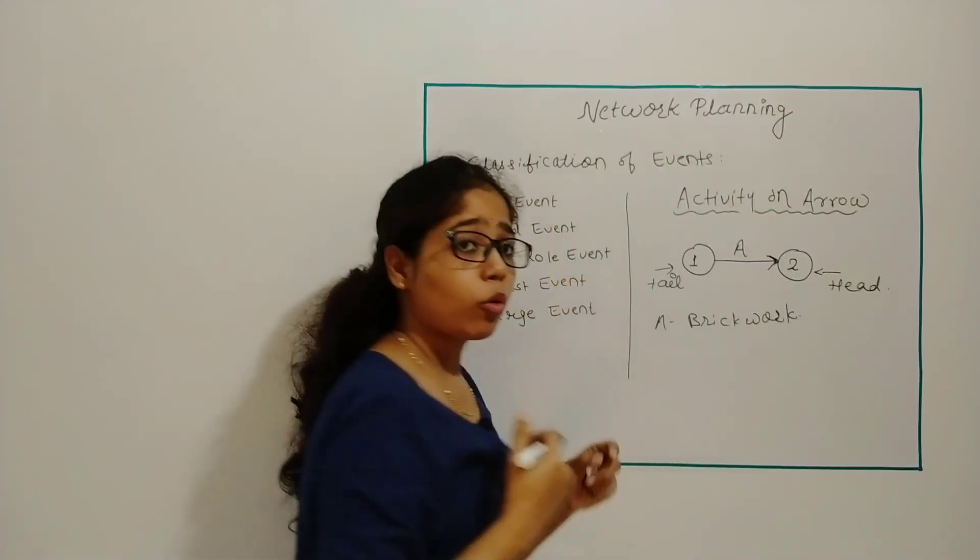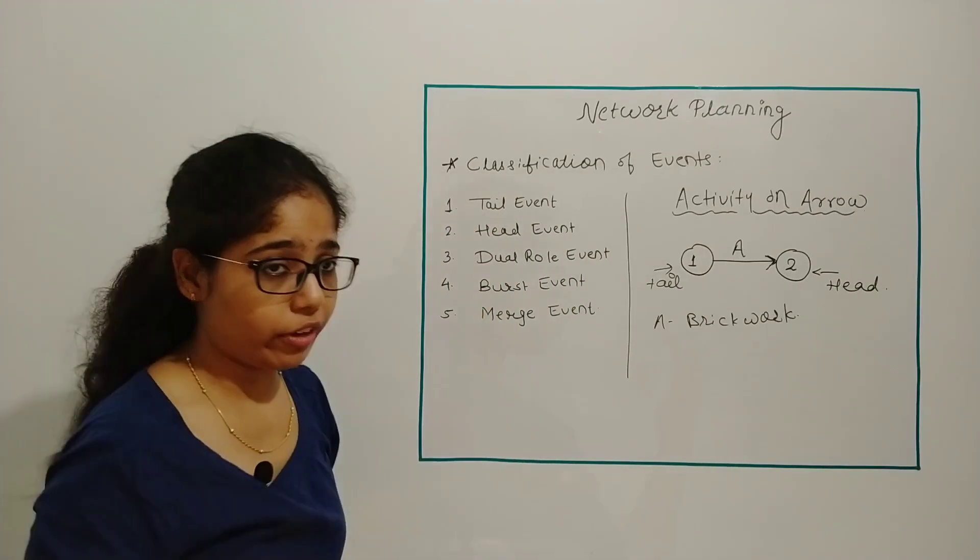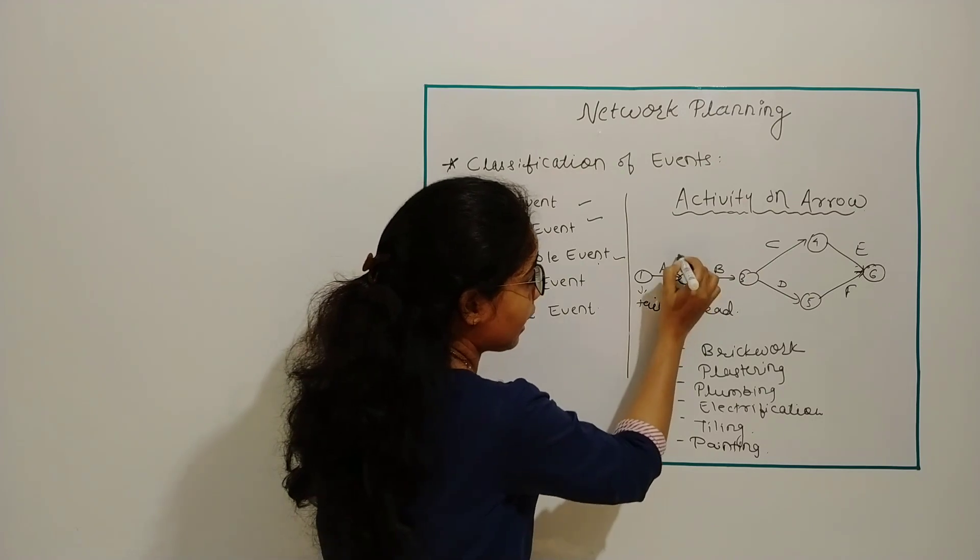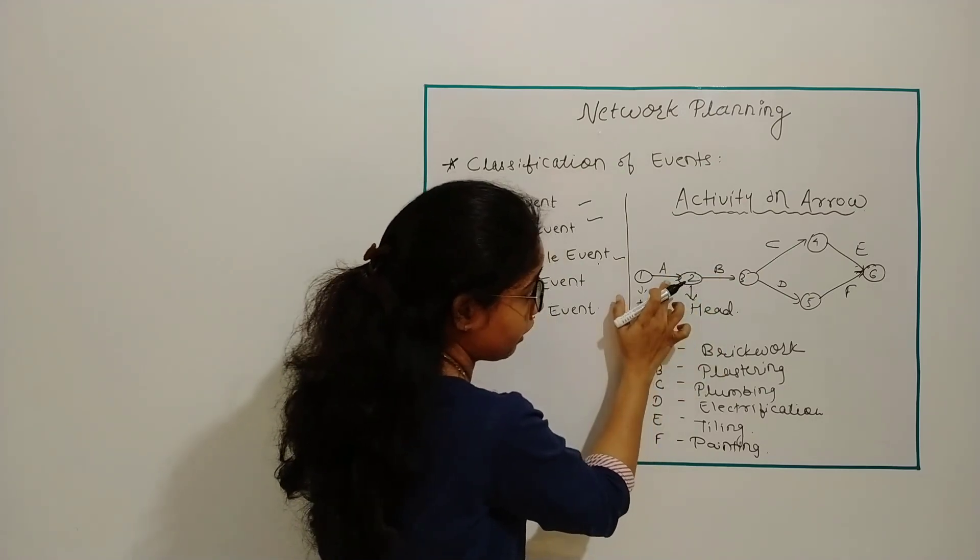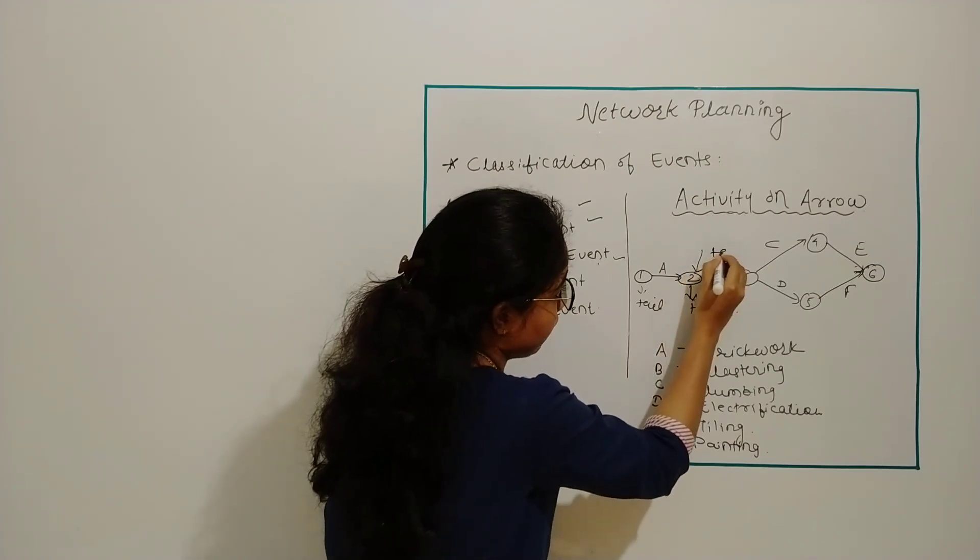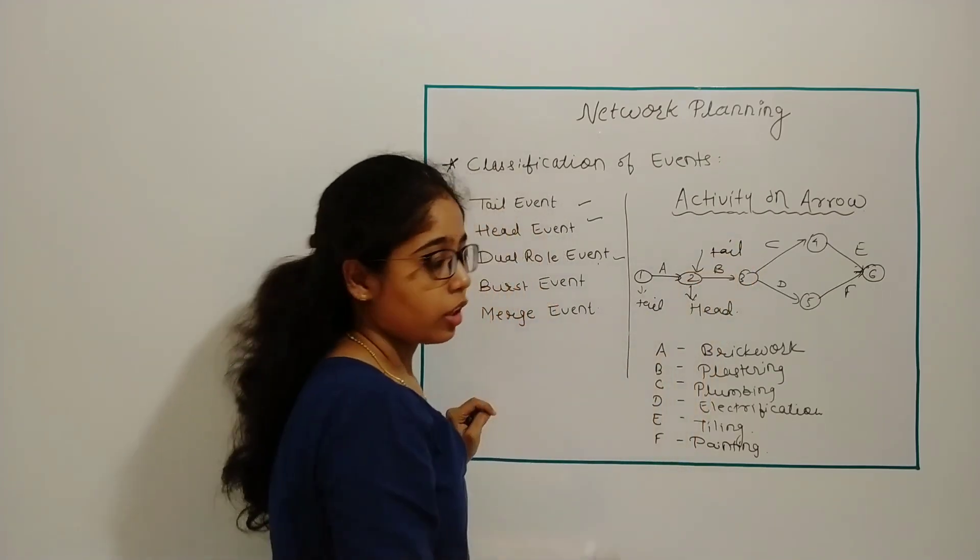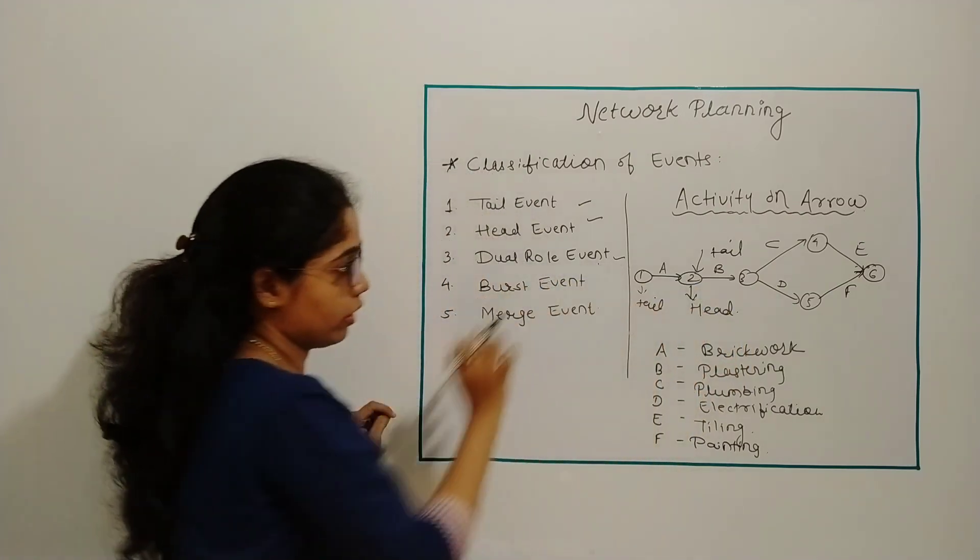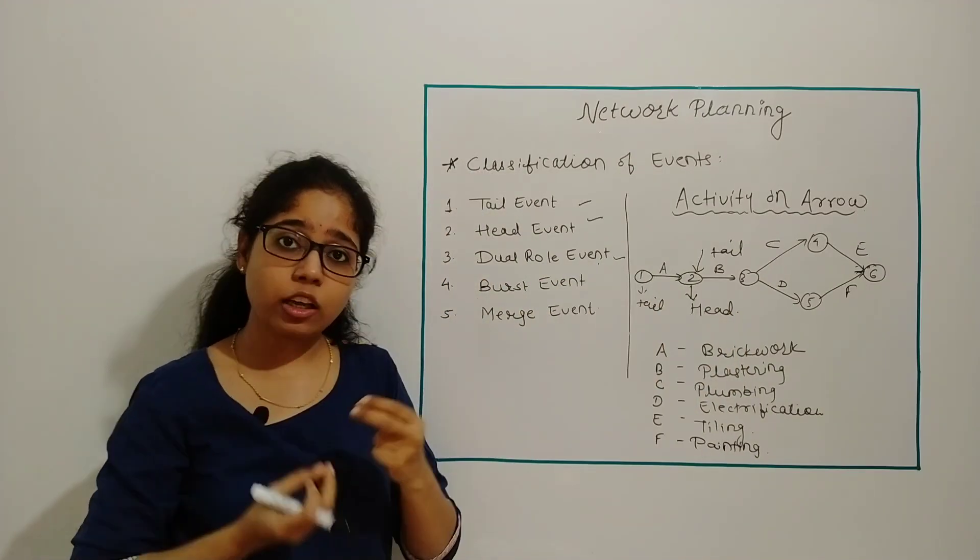Now moving towards dual role event. You can see this node 2 is acting as head event for activity A and tail event for activity B. So this node 2 is called as dual role event because it is playing both roles, head and tail, simultaneously.